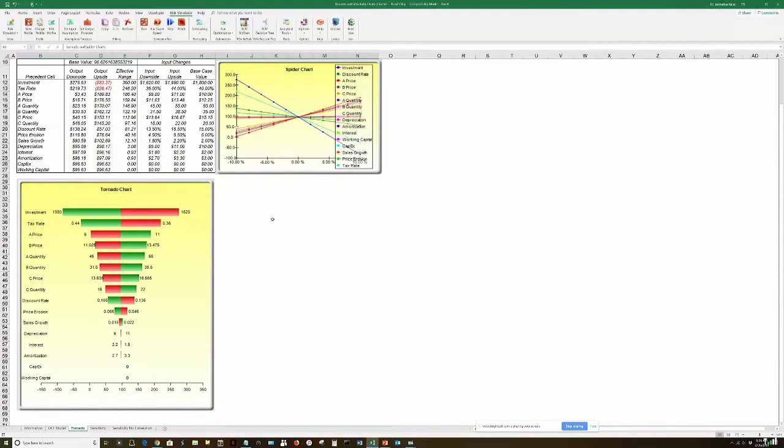An example I did was with Saudi Aramco in Saudi Arabia. Those guys were looking at pipelines for their oil and gas delivery system, a couple thousand miles of piping. And they were comparing that in an analysis of alternatives, looking at potentially trucking versus rail versus using ships to transport raw materials and so forth. And the main criticism that they had internally was that price of steel was extremely high. Price of steel is too high. We can't afford to build this pipeline and all this good stuff. And they kept obsessing about price of steel for 6 months. So when I went in there, did consulting work for them, I ran a tornado and showed them that price of steel was way down there.